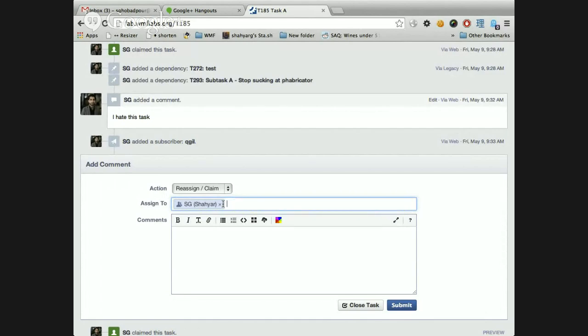Now, the way I would envision this to happen, for random tasks here and there, it's fine to assign directly to a developer. But for a task that's quite large, which happens frequently, like on the extensions level or in core features, we'll have a very large task that could take multiple weeks and multiple developers. Ideally, that should be assigned to someone in charge of a given sub-project within a project. So it could be the project manager, Scrum Master, or even a developer who wants to oversee that whole task getting done. And then you would create the subtasks or dependencies according to that and assign those to each individual developer.